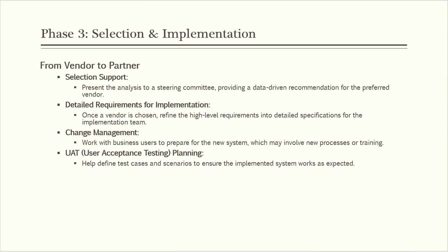And the UAT, acceptance testing or the testing planning, step by step to define the selection and implementation: how it is done by the vendor to gather the requirements from the business, to do the requirement analysis, to design the documents, to do the development on that product or the functions, and then implement and do the UAT, and the final production deployment. How those phases happen, how much time is required to complete each phase, and what SDLC methodology, like waterfall, agile, scrum, kanban, spiral, is used by the vendor to deploy that product or the functions in the bank or the financial institution.